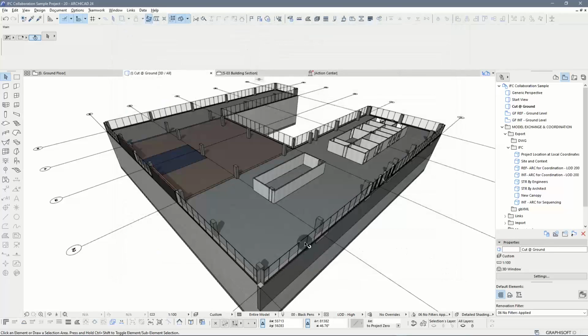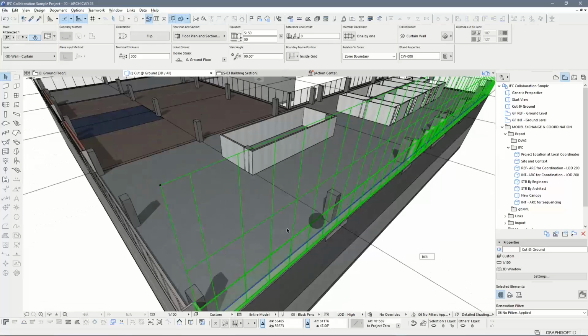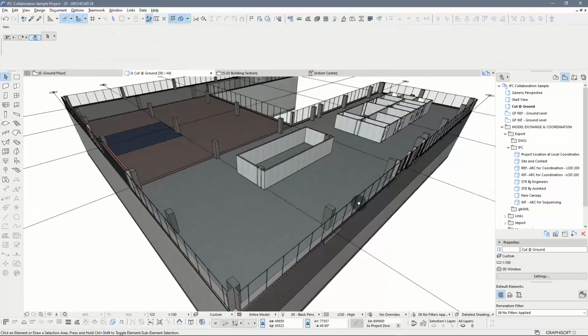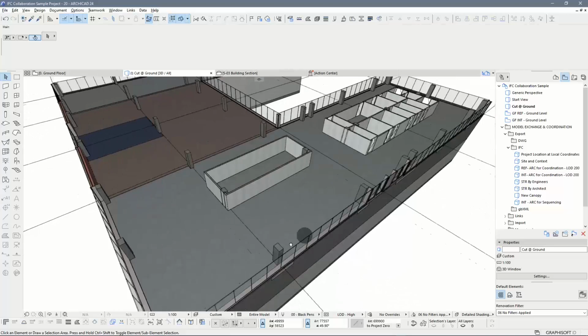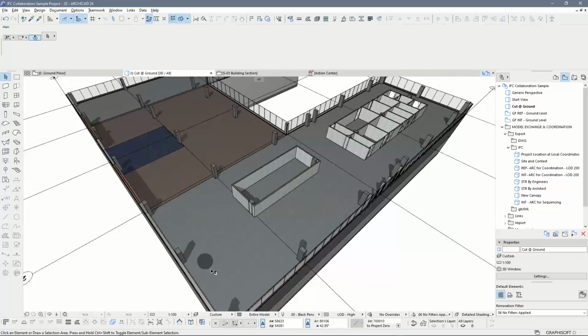So that will take care of things like this curtain wall, which now is going to be built out of sub-elements, walls like that one there. But then you will argue that, let's say in a building like this, all of that tiling in that floor may not be placed at the same time. Now, that is something that can be done from the side of a proper sequencing tool.